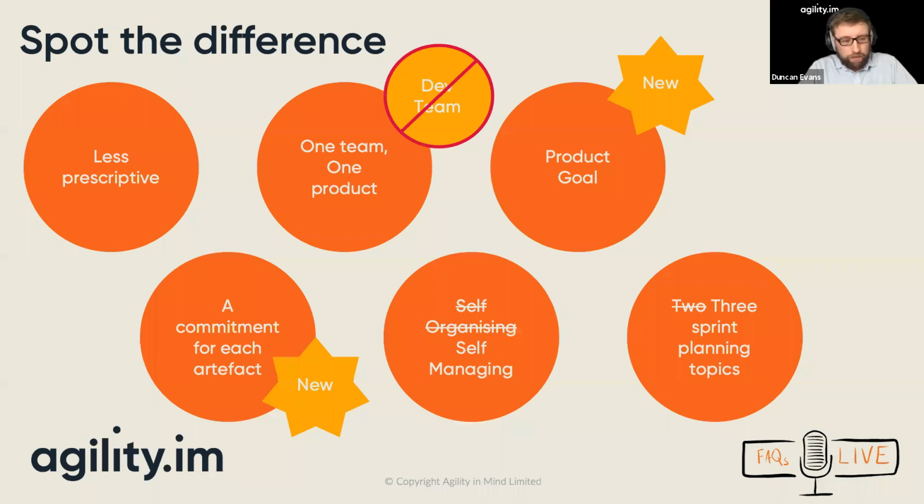I think this is actually quite an interesting one. I think it's going to prompt people to make their sprint plannings a bit more engaging, a bit less of a tedious Jira ticket fest. Yeah, I think this is the Simon Sinek change, isn't it? The start with why approach. One of the challenges lots of teams have when they're trying to create unity and work together is that the sprint is like a tapas menu of random things. But if you start off with a single why, what is the business objective we're trying to achieve, and then formulate the sprint goal, then everything else naturally hangs together in a sensible way.